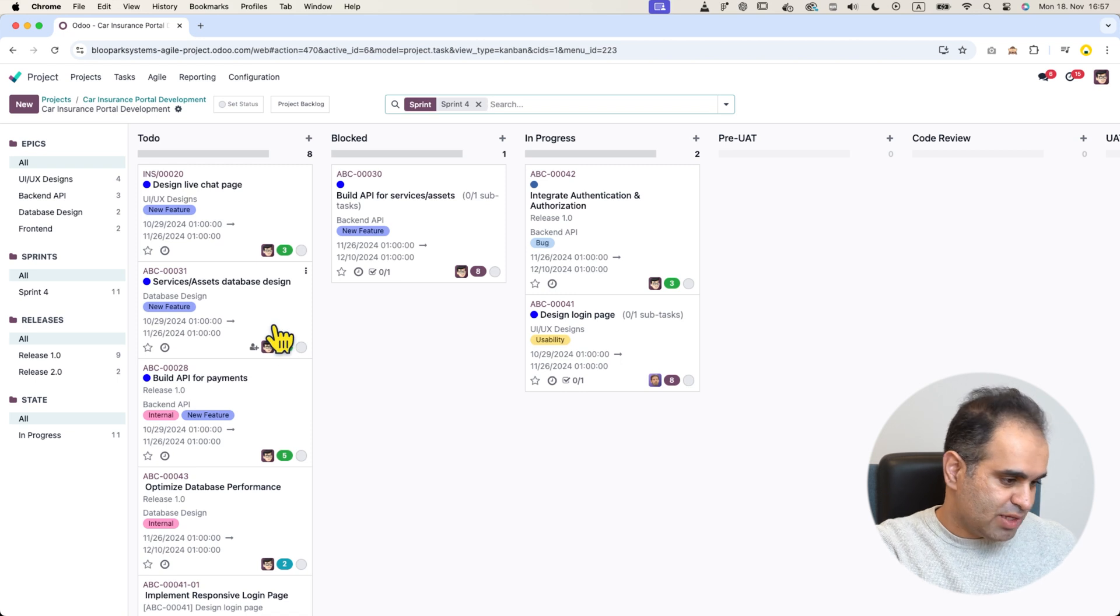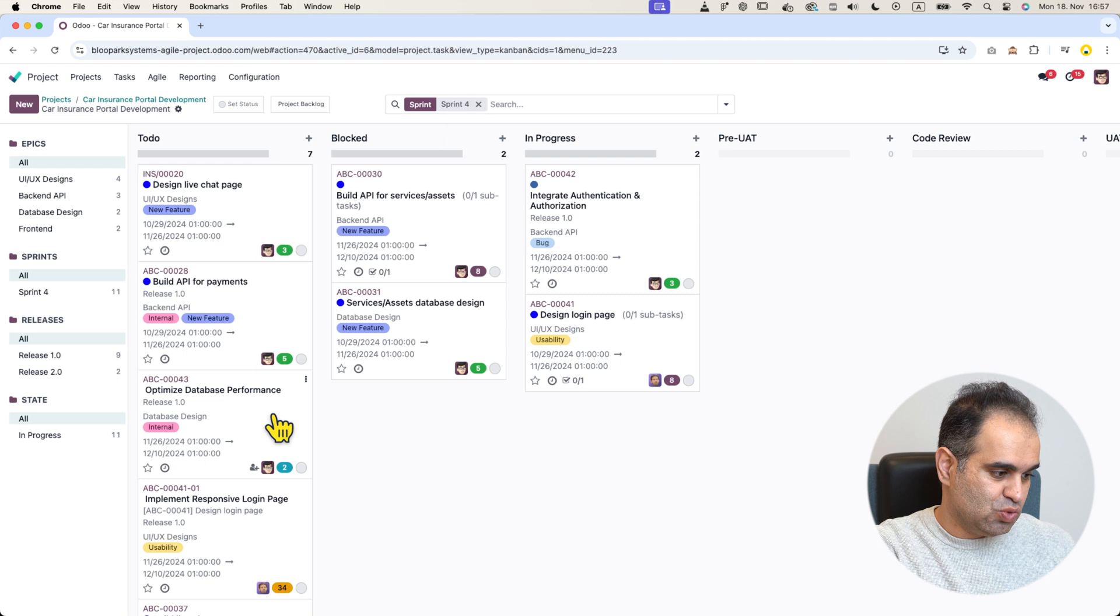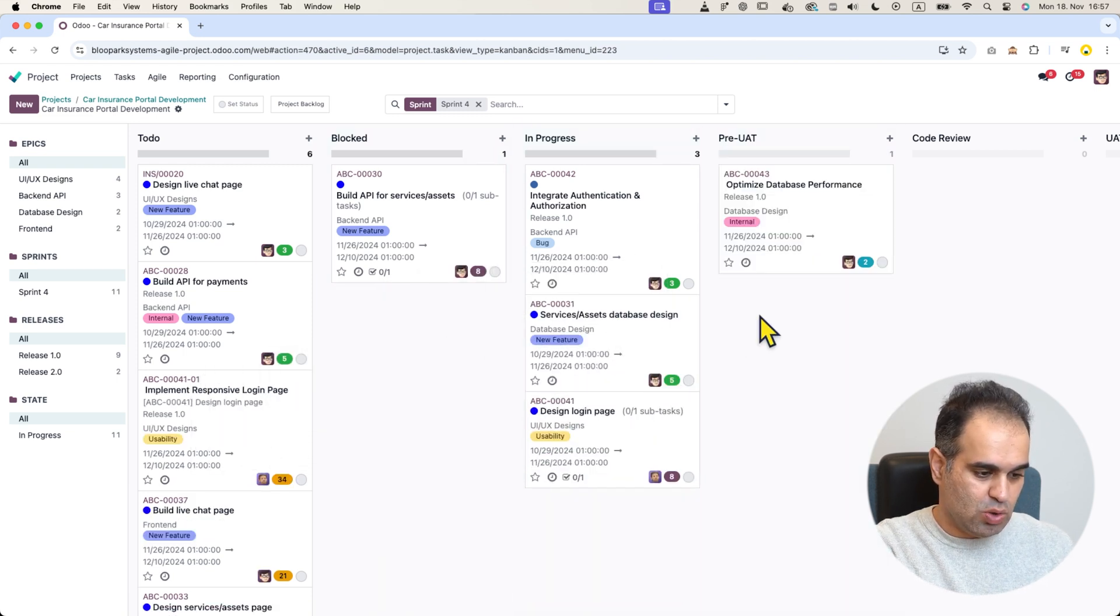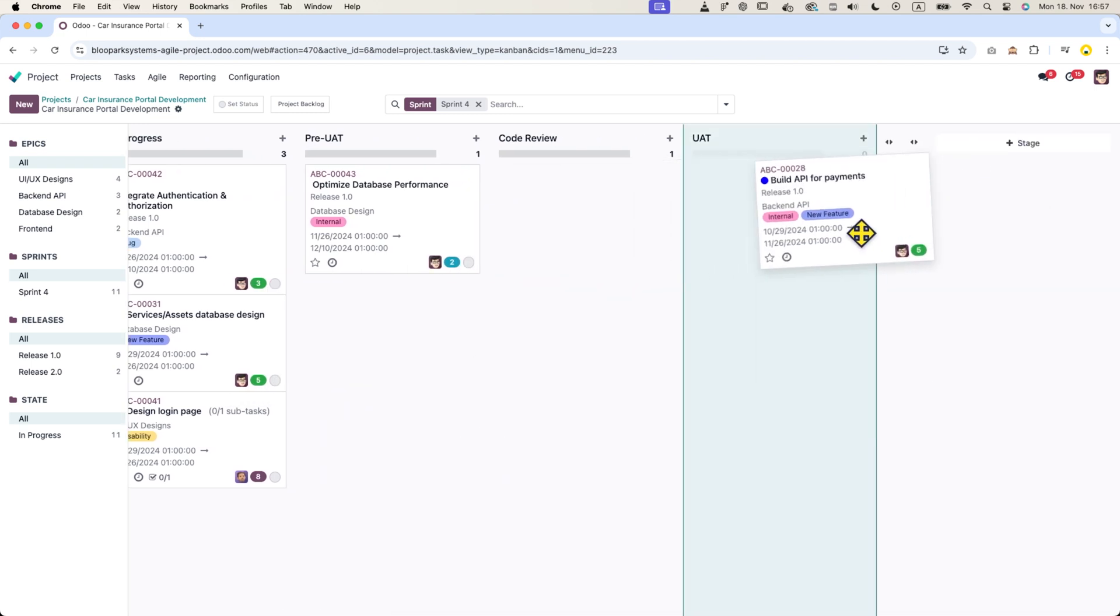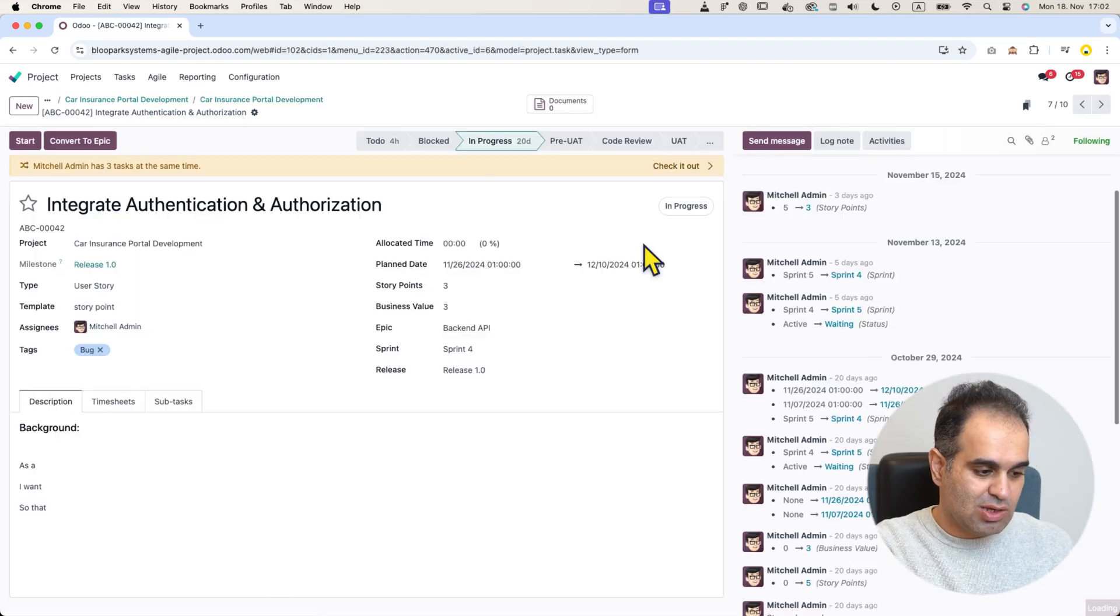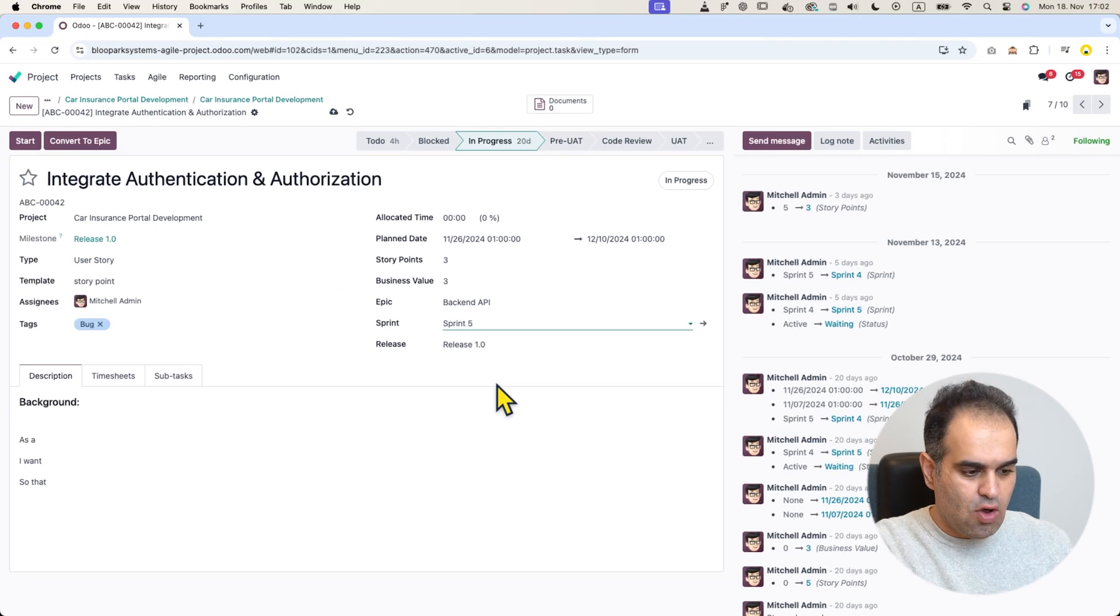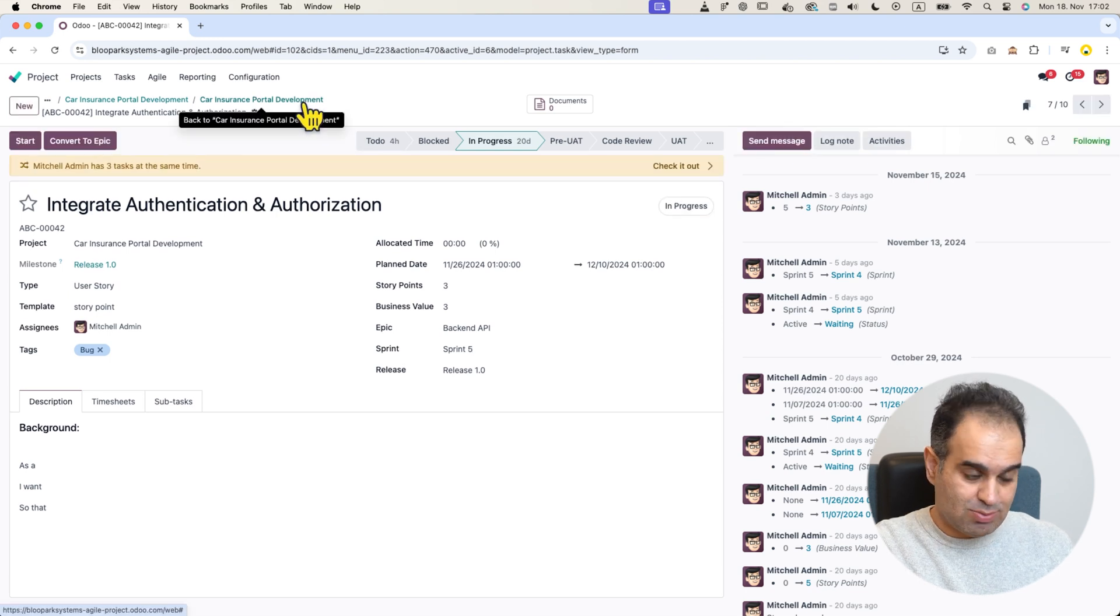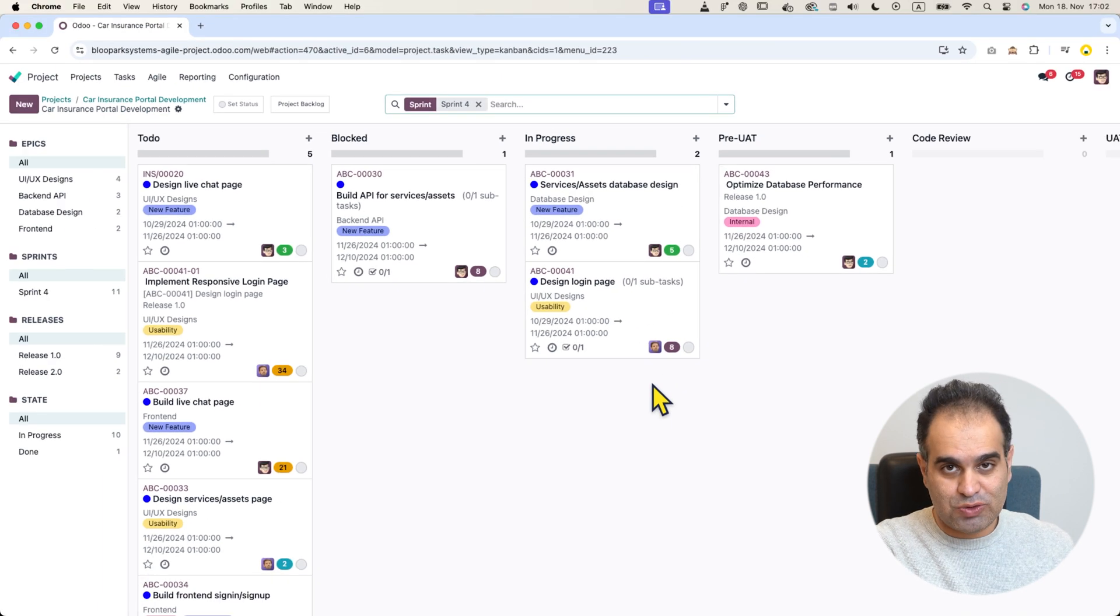We can collaborate by working on tickets, moving them from to-do to in progress, then to priority, code review, and so on until the tickets reach the final stage which is done. If a ticket is no longer needed for the sprint, we can simply open it, remove it from the sprint, or assign it to another sprint. Once saved, Udo will automatically remove the ticket from the current sprint, so it will no longer appear on the sprint board.